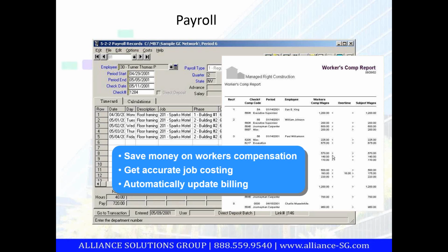Payables, we have payables in about every system that's out there. It's one of the most common applications outside of general ledger. But this allows us to tie payables into those subcontracts and purchase orders we had earlier. So again, I don't overpay that sub because I'm matching it back to a subcontract. I don't overpay that purchase order because I'm matching it up to what I committed or agreed to pay with the sub. So it automatically avoids double paying of the invoices.